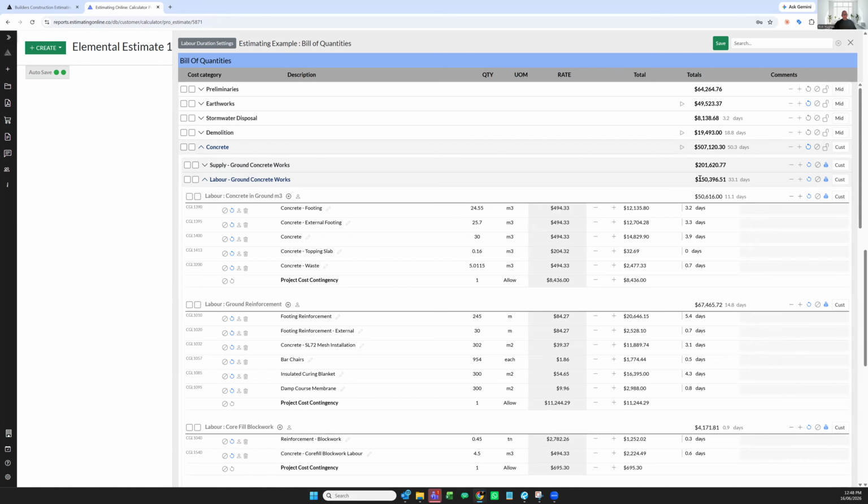This has a total budget of $150,000 and an allowance of 33 days to complete the work. How did we get to that construction price? I'm going to show you. The quantities multiplied by the rate equals a construction price. Then what needs to happen is we need to identify the level of risk. Is it low risk, high risk, medium risk, ultra, custom?